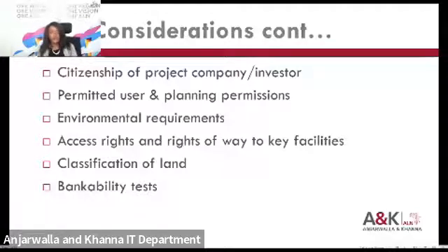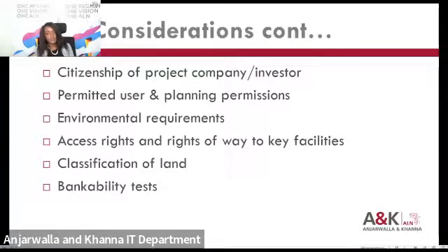There'll also be environmental considerations to be considered. So most project companies will be required to undertake some sort of EIA study to confirm the impact of the project on the surrounding area. There are instances where certain projects have been stopped or have been delayed because there's going to be an impact on things like flora and fauna, on animals and the people living in those areas.